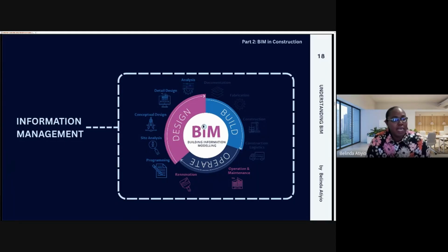So anyway, he goes ahead, he puts this family into it, it was a Revit file, and obviously that particular element is carried through. The model was given to the contractor, who used it to extract information, and at the end of the day, he went and procured a Twyford WC.